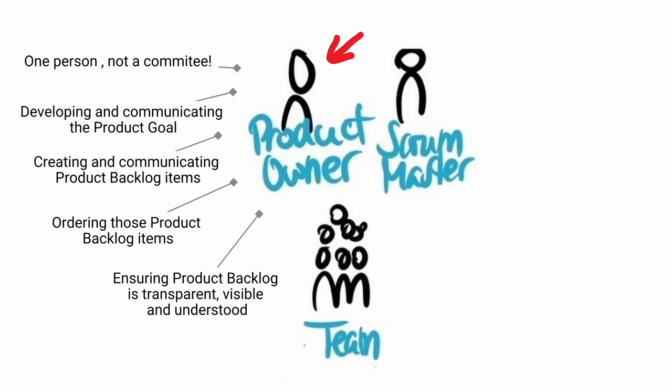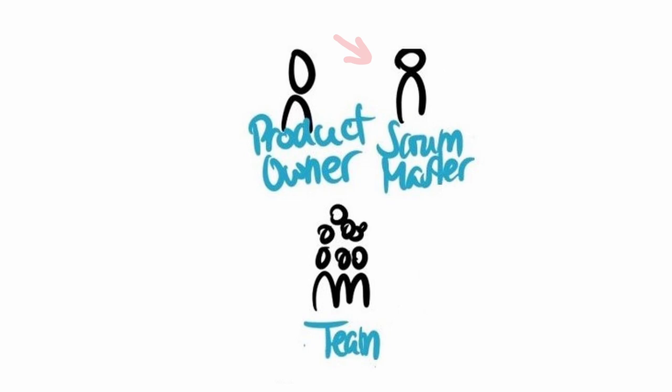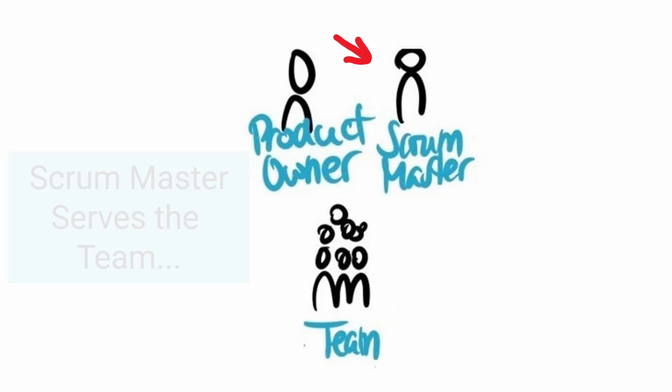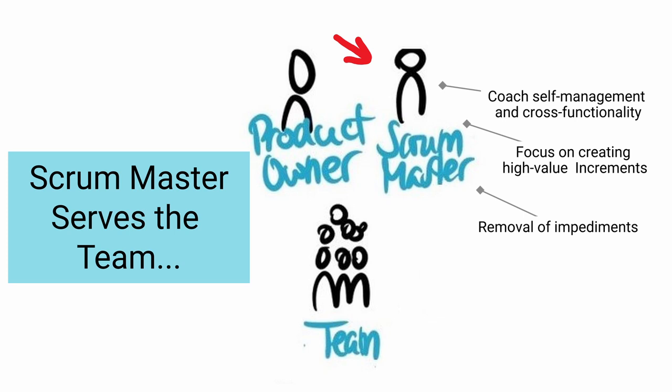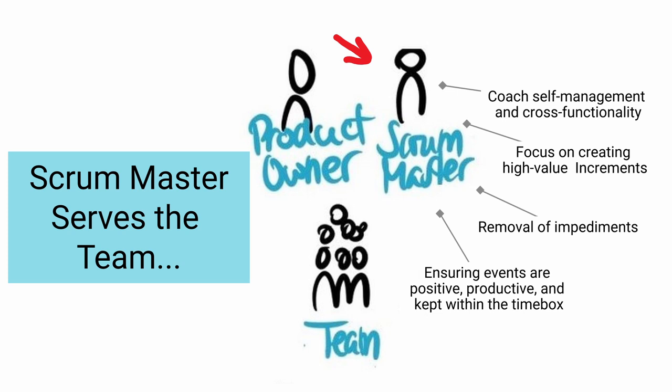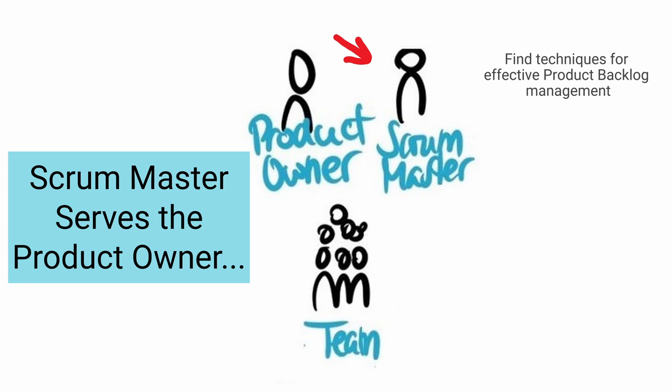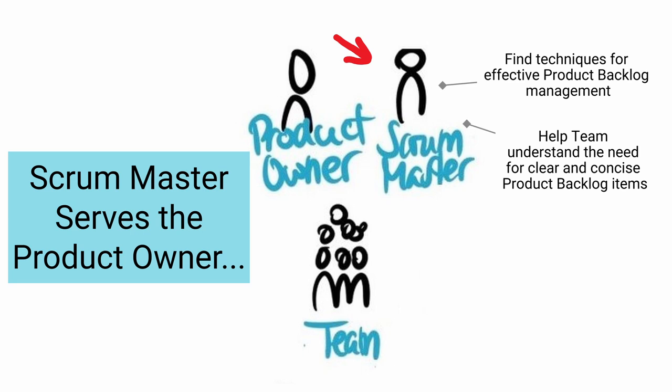Scrum Master. The Scrum Master is accountable for establishing and defending the Scrum process. They do this by helping everyone understand the theory and improve their practice. The Scrum Master serves the team by coaching members in self-management and cross-functionality, helping the team focus on creating high-value increments, removing impediments to the team's progress, and ensuring that all events take place, are positive, productive and kept within the time box. They also serve the product owner by helping find techniques for effective product backlog management, helping the team understand the need for clear and concise product backlog items, helping establish empirical product planning for a complex environment, and facilitating stakeholder collaboration as requested or needed.